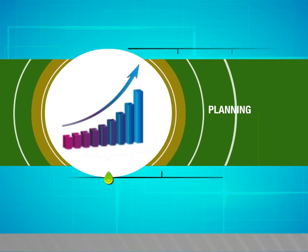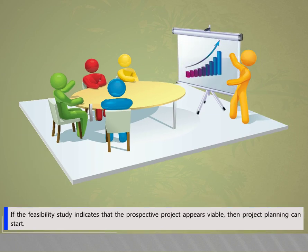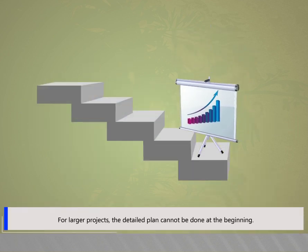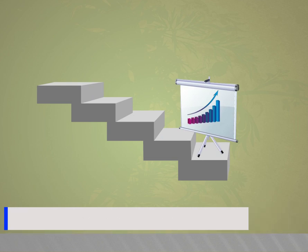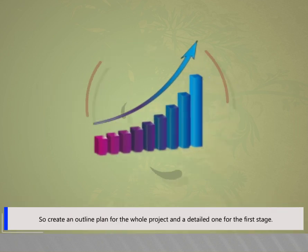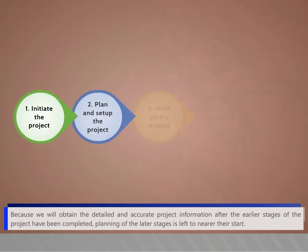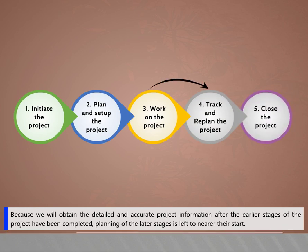In this video we are going to see about planning. If the feasibility study indicates that the prospective project appears viable, then project planning can start. For larger projects the detailed plan cannot be done at the beginning, so create an outline plan for the whole project and a detailed one for the first stage, because detailed and accurate project information is only obtained after earlier stages are completed.